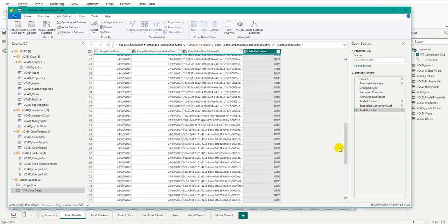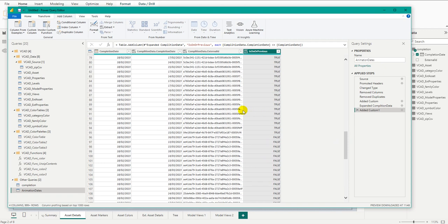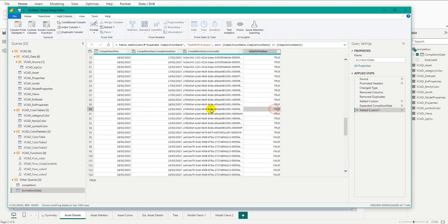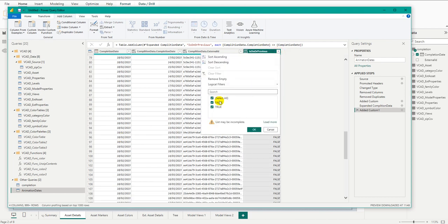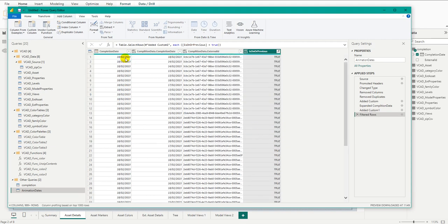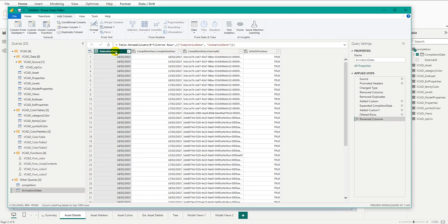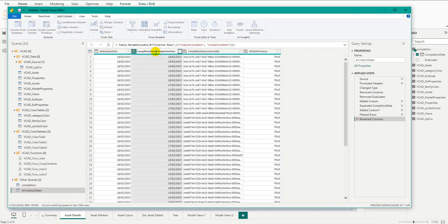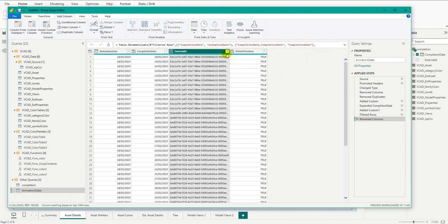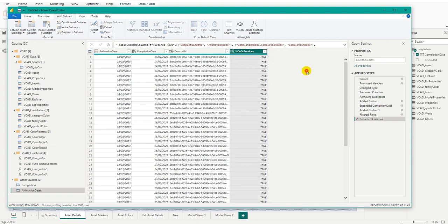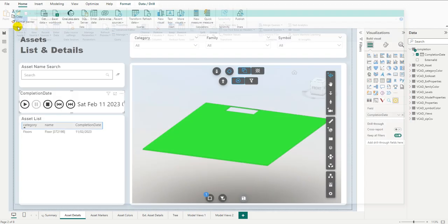And so now we can see I have a column with true false values. And if we scroll down a bit, we can see the table is now telling me true. So 15th is lower or equals to the 18th of February. If we go down a bit, the 16th of March instead comes after the 18th of February. And so we have this column, which we can easily filter. So let's only keep the true values. And so now we only have couples of dates where the completion date, which I would call animation date, is smaller or equals to the animation date. Let's go ahead and rename this to completion date as well. This can be simply external ID. And is on our previous, we don't actually need this column right now, but let's just keep it for now. So let's go ahead and simply close and apply our transformations.